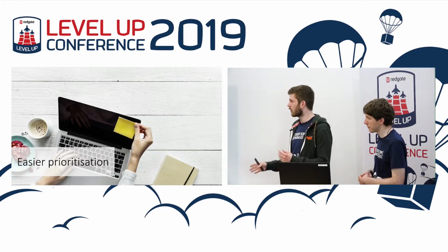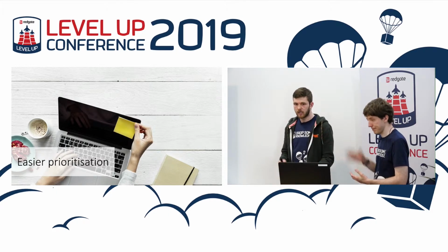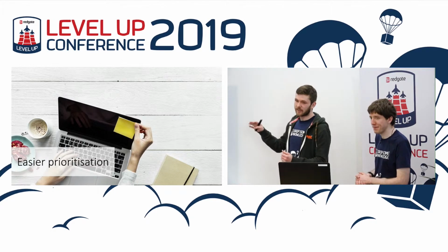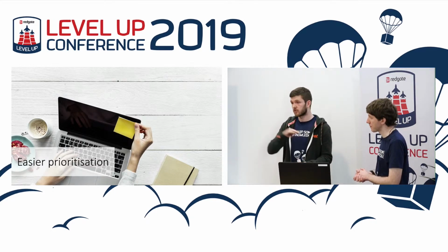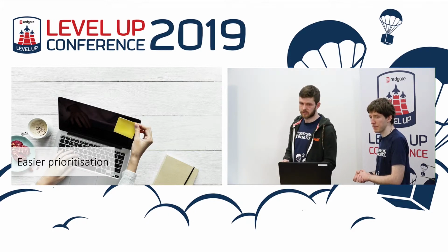If you're working in a more kind of pull-based Kanban style system, I know a couple of teams at Redgate are effectively, yes, Chris is doing that. Any bugs that come in that you say you want to fix and you're going to prioritize fixing, they just go straight onto your to-do column so that a dev can start working on them as soon as possible. Easy.